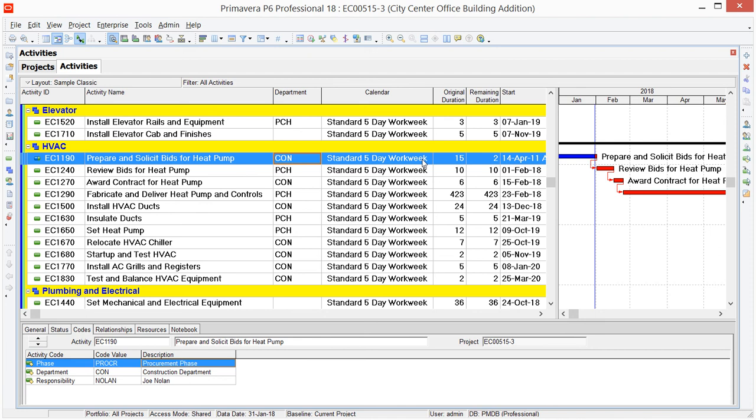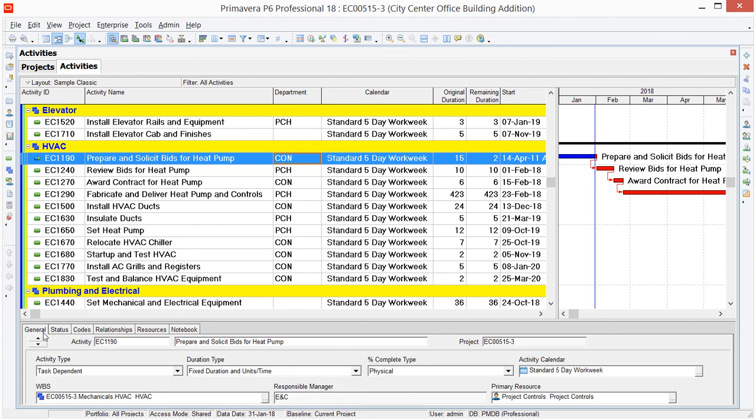So we could select the General tab for each activity and change the calendar assignment, we'll say in the long way, on that tab, using this activity calendar field here. Or if we use the Fill Down option, we can select into the column for the first activity. For Calendar, I can select my 6-day workweek calendar.